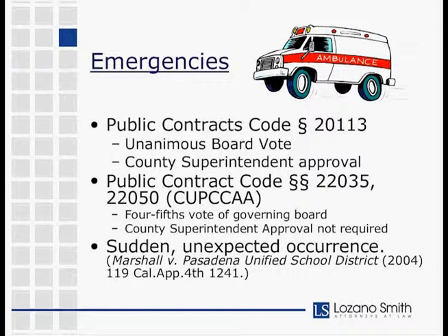Generally, for non-cupcake districts, the emergency exception is governed by 20113 of the Public Contract Code, and that requires a unanimous board approval as well as approval by the county superintendent before the district can go forward with the contract in the case of an emergency without competitive bidding.